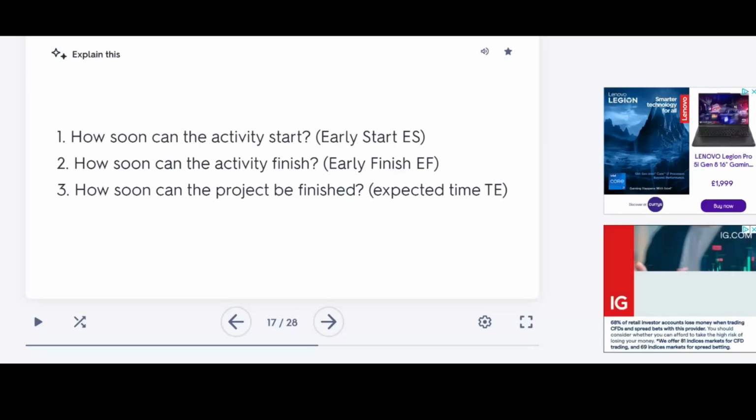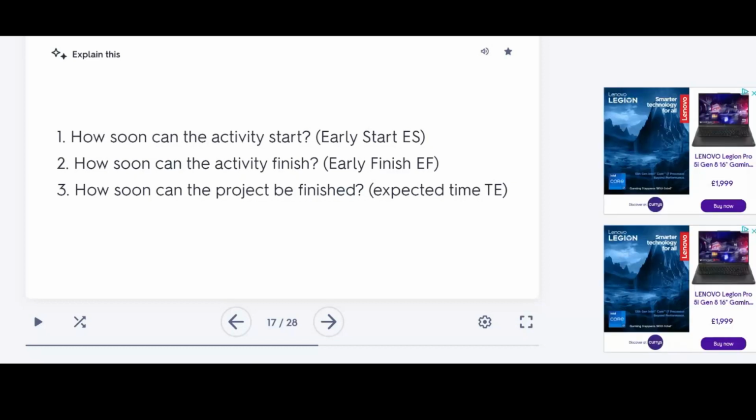If you finish the forward, you find the earliest finishing time. If you do the backward, you find the latest starting time, and these two numbers minus each other equal 0 is what the critical activity should be. So there are three parts of the job. You need to be quite clear which part is which in order to get the critical path.